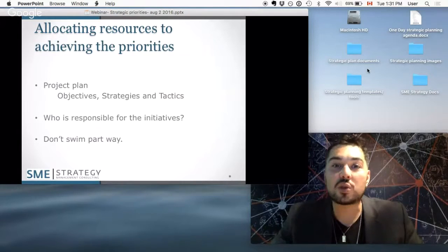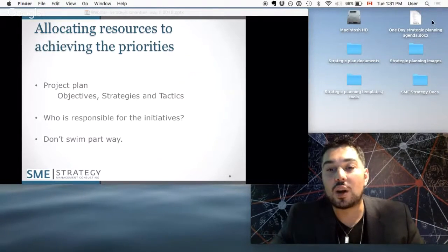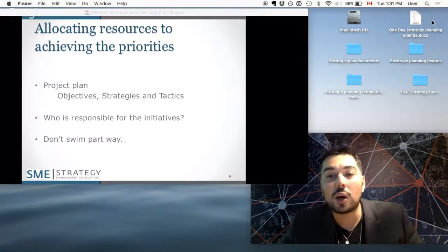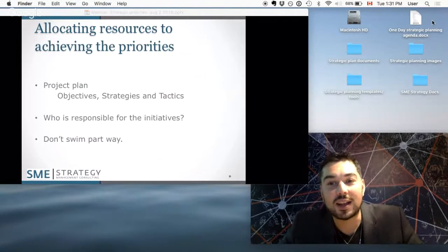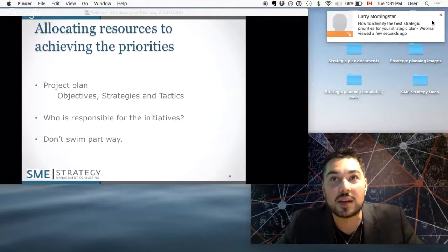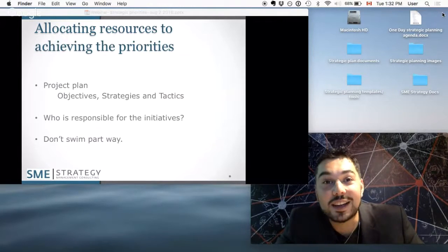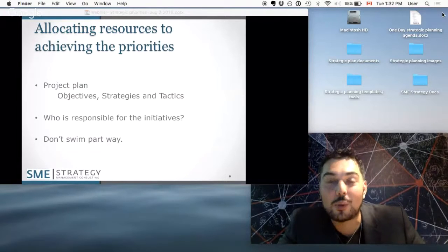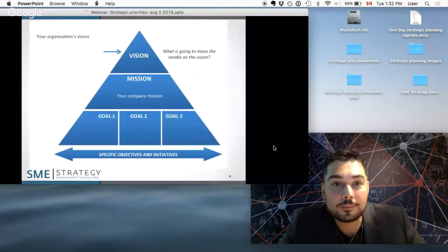And why I say don't swim part way, if you know that it's going to take $50,000 to move this initiative forward, and you say, we're going to give it 30 grand. Well, it's like saying, okay, well, I can swim 10 miles, but the island is 20 miles away. I'm going to die on the way there, and it's not going to do anybody any good. So if you're not going to allocate the proper amount of resources to a project, don't take on the project. Otherwise, it will not be successful. Okay, so don't swim part way.